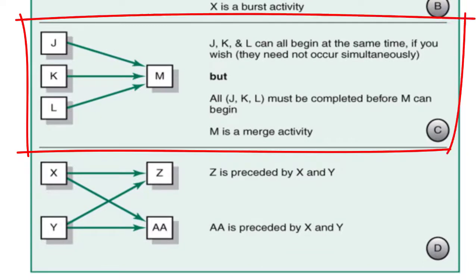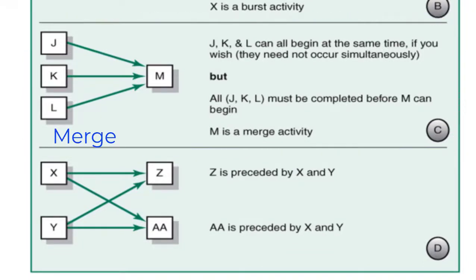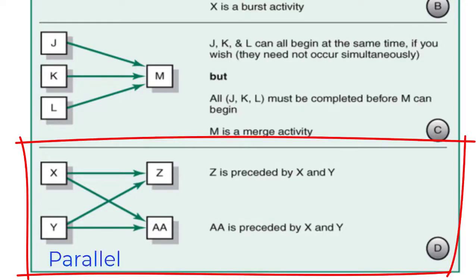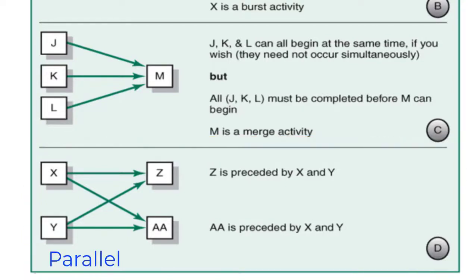C represents a merge activity. J, K and L can all begin at the same time if you wish, but they need not occur simultaneously. But all of J, K and L must be completed before M can begin, so M is a merge activity, with J, K and L merging into M. And D shows parallel relationships: Z is preceded by X and Y, and AA is preceded by X and Y.